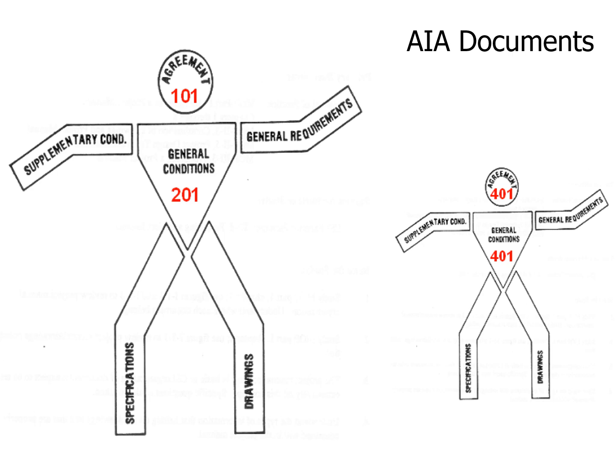Now 201 is general conditions. That's what pertains to the architect and the contractor and the owner. So that's a little bit of everything for us. Now your 401 is your contractor-subcontractor agreement. So that's from you to your sub. Okay, your agreements.